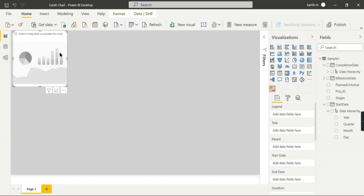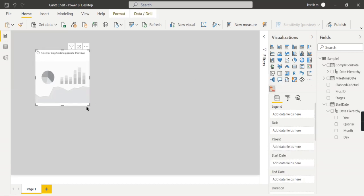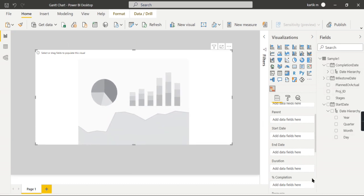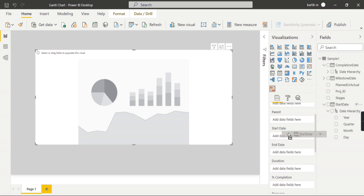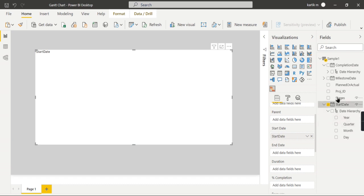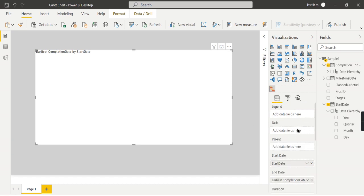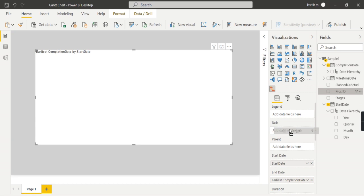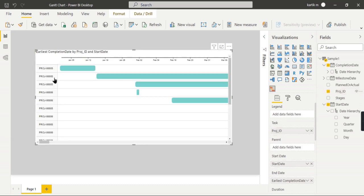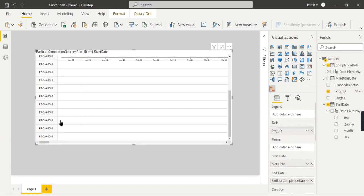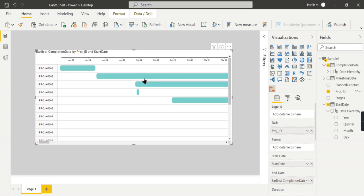When I click on it, it will appear here. Let me explain the mandatory fields. As we are going to track the project schedule, any schedule should have a start date and end date. Let's drag and drop the start date and end date first. Then another important field here is the task—whatever you want to track. Let's start with the project.